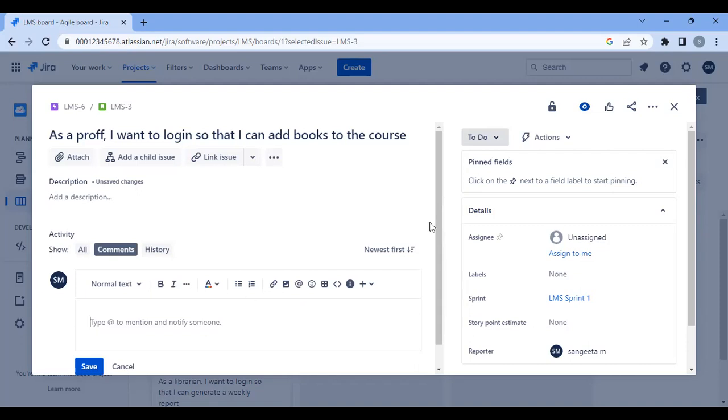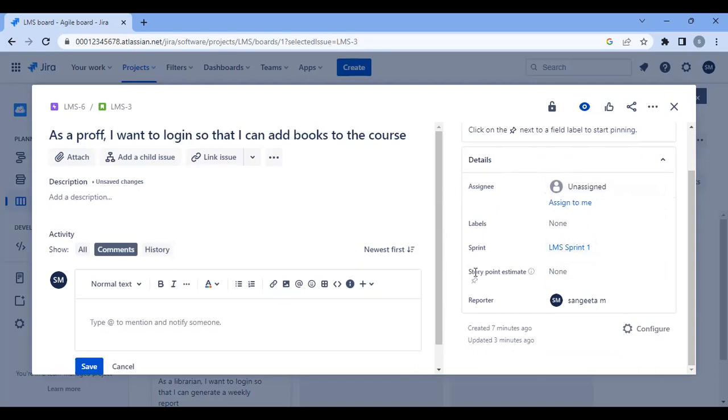Okay. So here you will have to assign it to somebody, guys. You can either assign it to self or assign it to anybody else. Then you'll just check. Story point estimate is nothing but the complexity points. So basically, how many hours a developer will spend on this will be mentioned here. This discussion will happen in a sprint planning meeting only. In Jira, you'll only enter that number and you'll say yes. So 5 is nothing but 5 hours. Clear, guys? Are we all clear with this user story? Then I will save it.